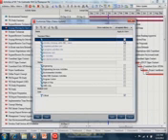Mike? I just want to make sure I understood what you said. That 10 days is from the last data date? Yes. So if the last data date was 9 days ago, it's only going to show me the last 9 days plus tomorrow? Yes. Okay. It's not 10 days from today? That's correct. It's not 10 days from today. It's from the data date. And that capability, you can do that with portfolios and projects both?